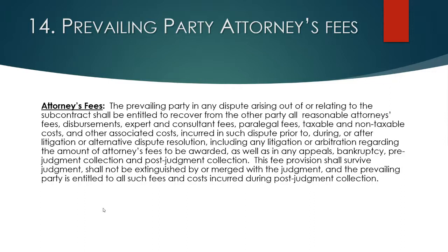And the idea here is, with this kind of broad provision, you want to be made whole. And by being made whole, if you prevail, not only do you recover the damages that you incurred, but you recover the costs back that you had to pay for attorney's fees to get you to the finish line. So that's the idea of this type of broad provision.